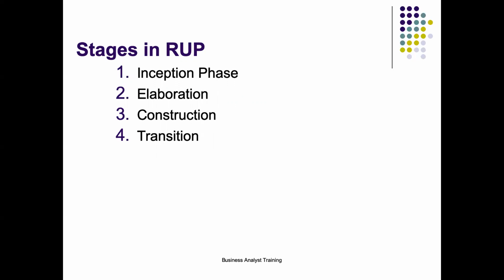It's just that they are trying to merge certain disciplines, or certain things that need to be done, into multiple phases. So they call it the inception phase. The inception phase is where the prime objective is to understand the scope of the system, validate the cost, do a cost and budget analysis, and understand what needs to be built at a very, very high level, right? First of all.